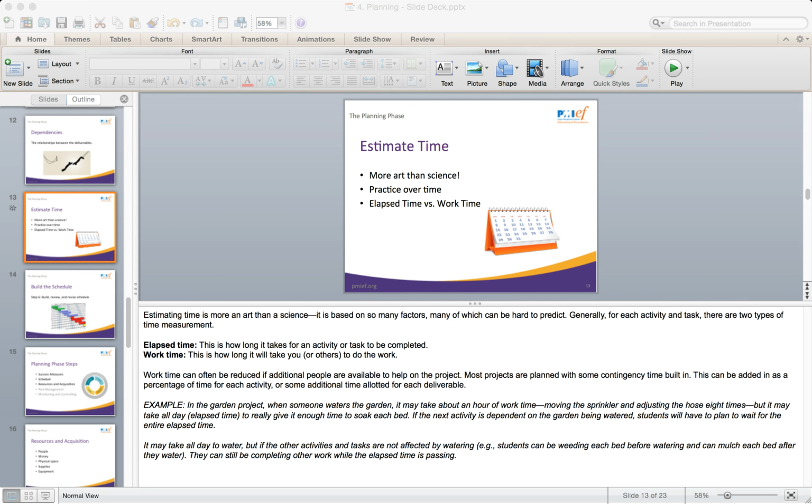Once the risk level and areas of impact have been assessed, each risk can be paired with a corresponding plan to address it. This may mean identifying what can be done to reduce the possibility and/or what can be done to reduce the impact of the negative event if it occurs. Sometimes, as part of the risk management plan, there are resources allotted for contingency planning, setting aside time, funds, and other resources to be used only for unplanned events.